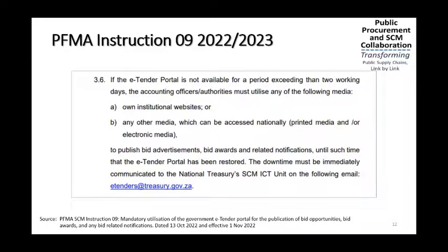If the tender portal is not available for a period exceeding 2 working days, the accounting officer must utilize any of the following media: their own institutional website or any other media which can be accessed nationally, printed media and or electronic media.